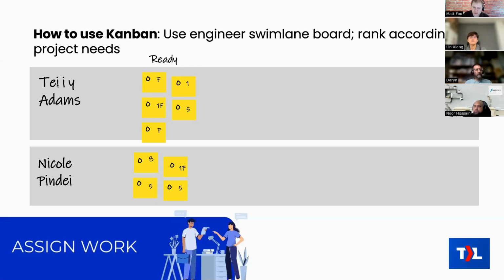So notice up until this point, the swim lanes have been the project swim lanes. Now we switch them around and we do the member swim lanes. So here we have a swim lane for our individual members. We've got a swim lane for one staff here and for the next staff here, and that would go down for all of the members of your team. And within that, when you assign those tickets, they appear in their swim lane, and within that you can rank them. So we've got your highest priority ticket here, second priority, third, fourth, fifth, and so on.